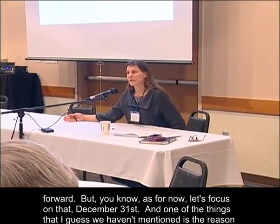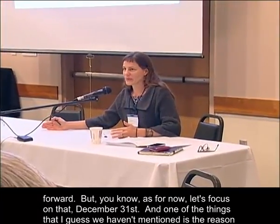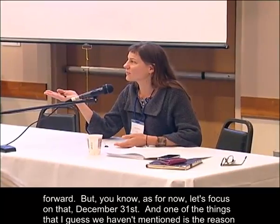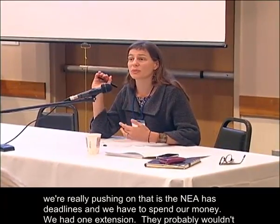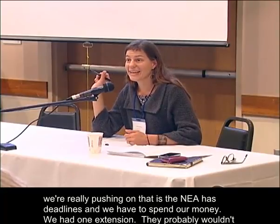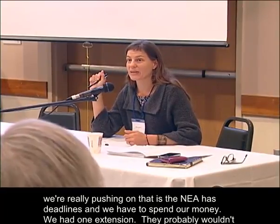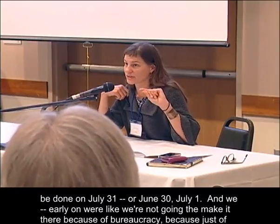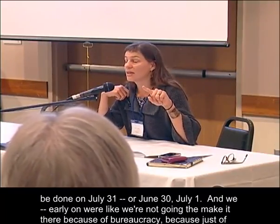But as for now, let's focus on December 31st. One of the things that I guess we haven't mentioned is the reason we're really pushing on that: the NEA has deadlines, and we had to spend our money. We had one extension. They probably wouldn't appreciate me saying that they allowed it, but it was for 6 months. Initially this project was supposed to be done on June 30th or July 1st.